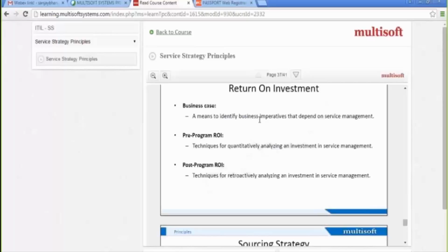This business case runs all over the project life cycle. Project life cycle means the project will initiate first, then I need to plan, then execution, then monitoring and controlling, and then closing. So this is my life cycle. Over the life cycle I need to take care, so there should be a business justification. So the business case is also my business justification. That is the business case we have.